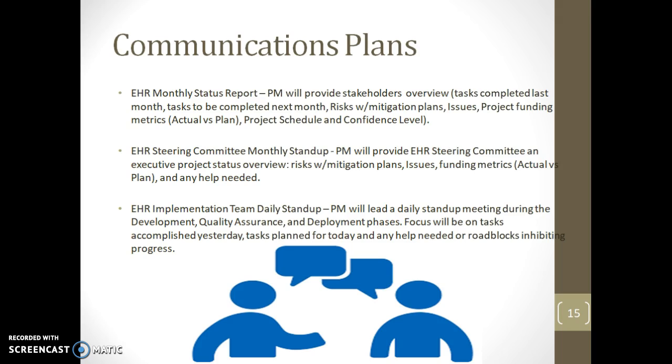The EHR team daily stand-up. The project manager will lead a daily stand-up meeting during the development, quality assurance, and deployment phases. Focus will be on tasks created and accomplished yesterday, tasks planned for today, and any help needed or roadblocks inhibiting progress.